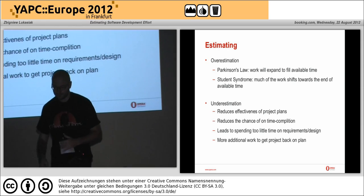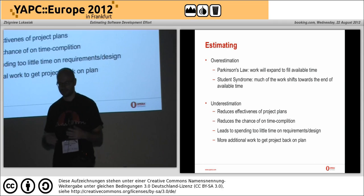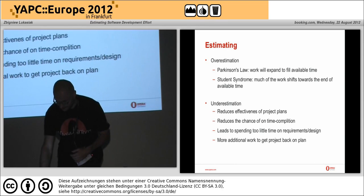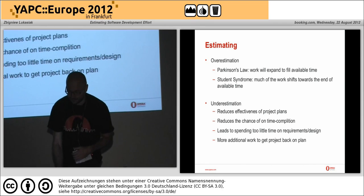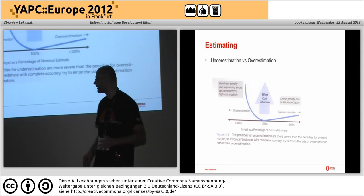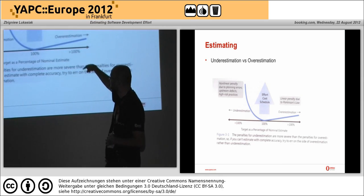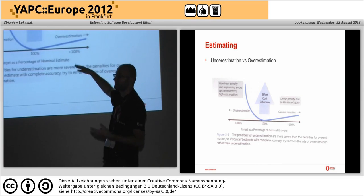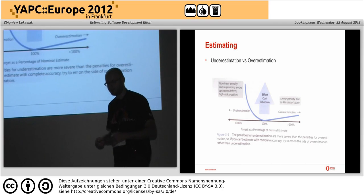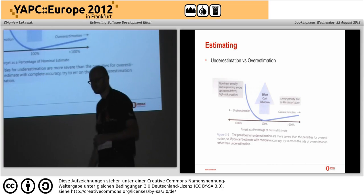With underestimation you also have additional work: going to meetings to explain why it is late. It also leads to spending less time on requirements and design, making future work even worse. The cost of underestimation is exponential or worse than linear, while the cost of overestimation - taking into account Parkinson's law and Student Syndrome - is mostly linear. So it's better to overestimate.